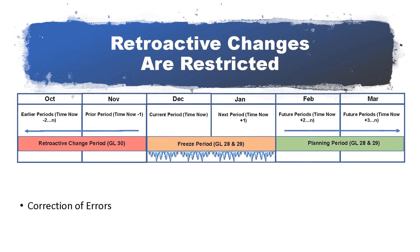Questions often arise regarding the allowability to make changes to data in the periods preceding the current month — in other words, true retroactive changes. As mentioned before, any changes to the data in prior periods are recorded in the EVM reports as current period changes, and discussed in Format 5. These changes are generally limited to correction of errors, including accruals, reversals, and time card adjustments.